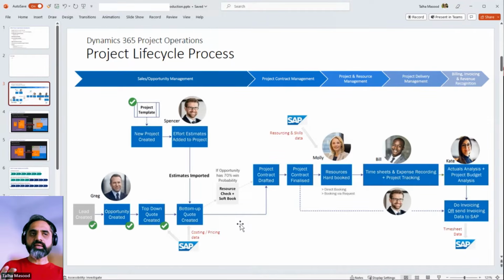If you have advanced knowledge of, let's say, the month after next, or the next quarter, that there is a project coming, I will have to keep Mr. X, Mr. Y, Mr. A and Miss D available, because the project is coming. I'm not booking them yet, but I'm keeping them available. I have in the back of my mind that there is a need being created for these people. That need will turn from yellow to green when the project actually comes. But at least the soft booking is there, and it tells you that the project is coming.